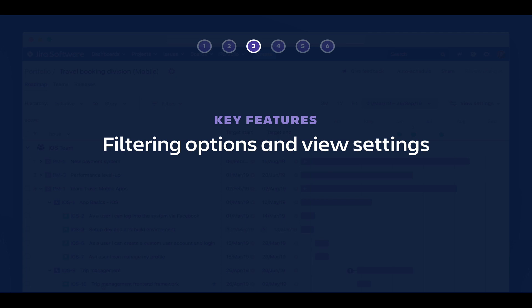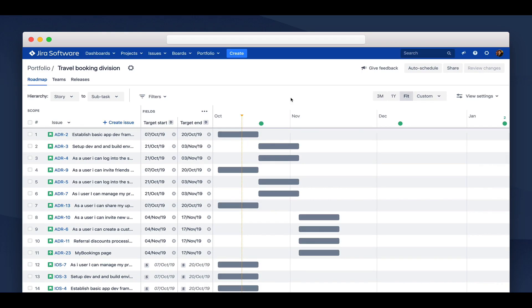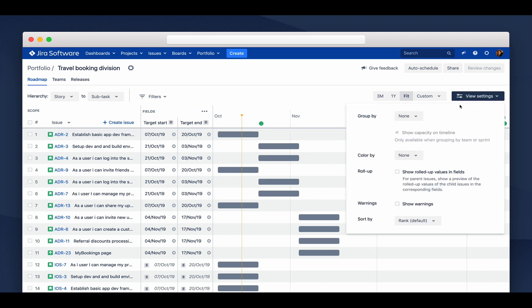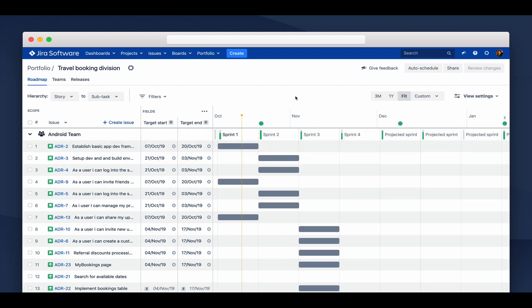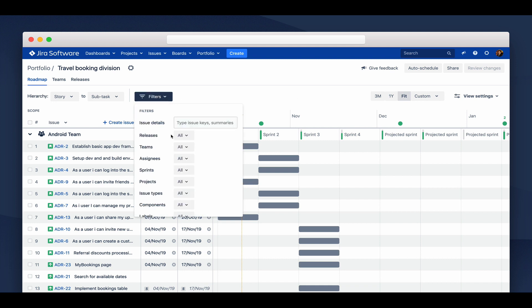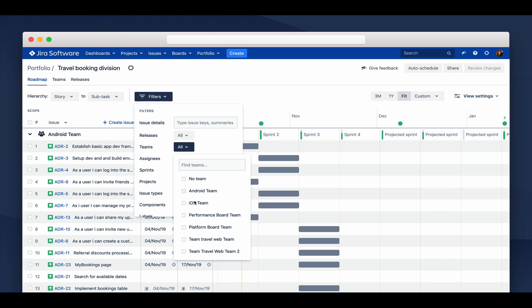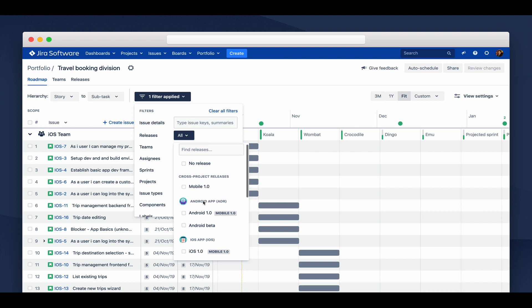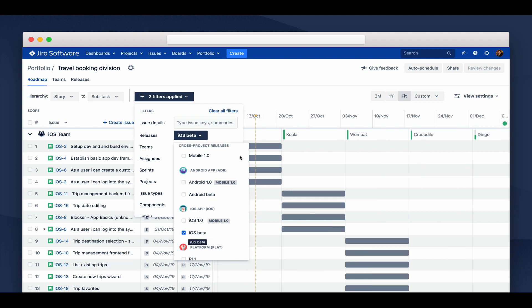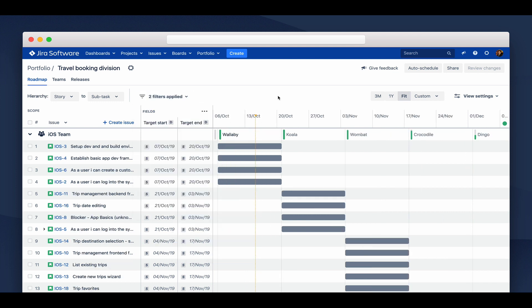Then there's filtering options and view settings, allowing you to see your plan through different lenses and tailor the experience for different audiences. After the 3.0 release a year ago, we rapidly shipped more improvements to the filters and view settings, so you have even more control over what is visible and how it's visualized. Let's configure the view settings for this plan to our liking. We can group issues by a number of different attributes. Let's see the issues grouped by team, and we can also choose to view the team's sprints on the roadmap. Notice how we're also showing the team's capacity per sprint. That helps us determine the feasibility of their upcoming plan scope. Now let's filter the results so that we're only looking at issues owned by the iOS team to get rid of the other groups. Let's also just look at the issues targeted for the beta release. So this effectively isolates all the issues in my plan to only see what I'm interested in looking at right now.